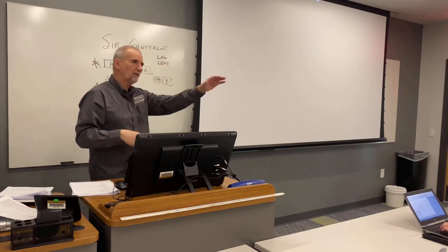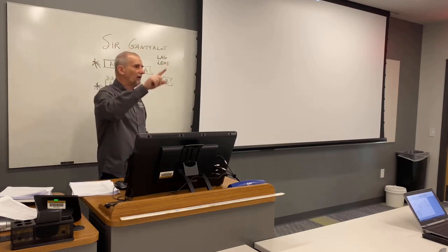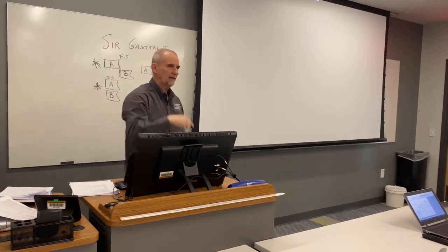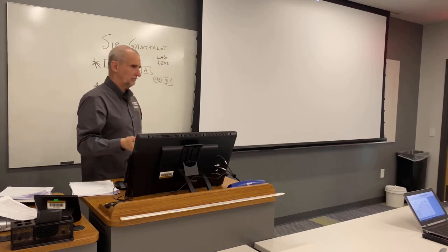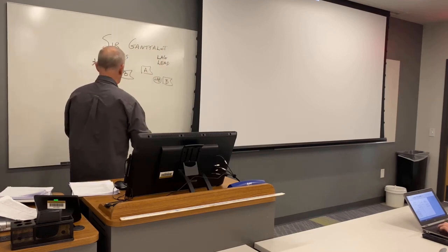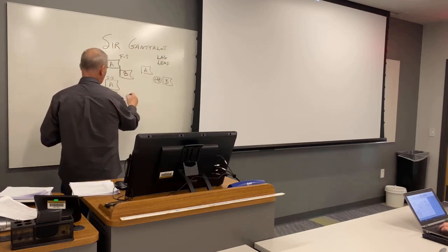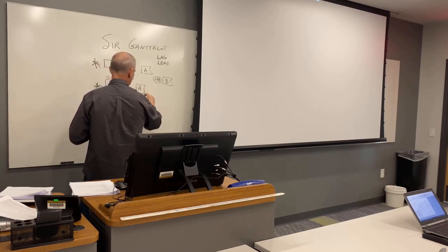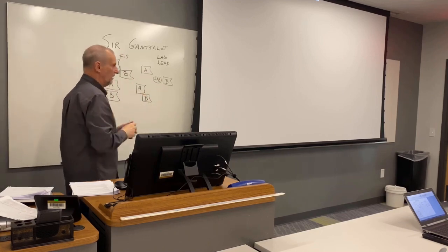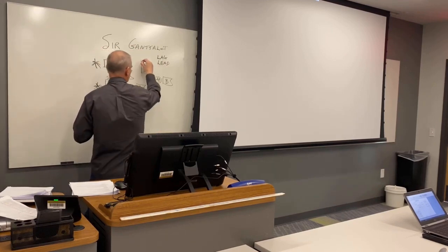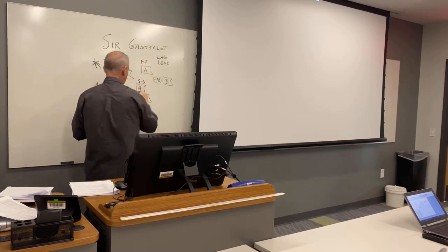So when you do your Microsoft Project, you put a number in there. A 3, it's finish to start FS 3. It's got to wait 3 days. You got it? Make sense? Okay. Now, the other thing you can do is instead of doing this, it can look like that. See that? You're not going to start them both at the same time. This is still FS, this is still SS.